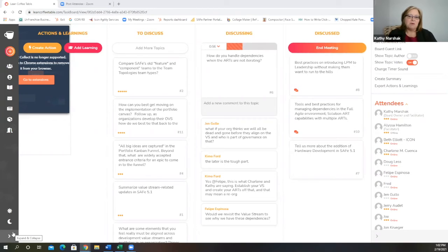once you are ready to address lean portfolio management topics, I find running the value stream workshop again as a double check is very beneficial, because that helps clarify and refine the development value streams, because those development value streams are what we fund in SAFe. And those development value streams are the foundation of our portfolios in a lean portfolio management world.